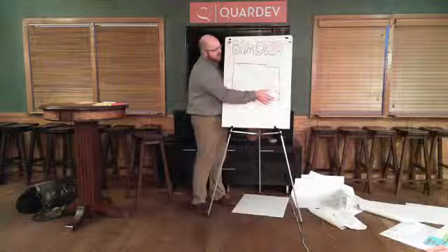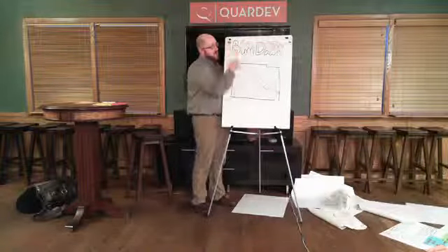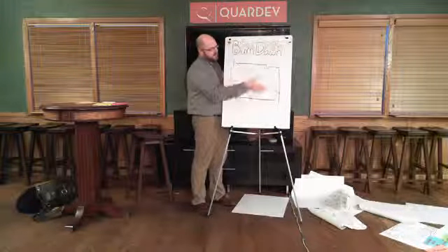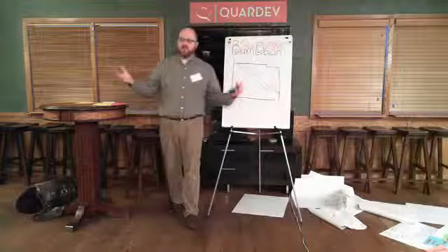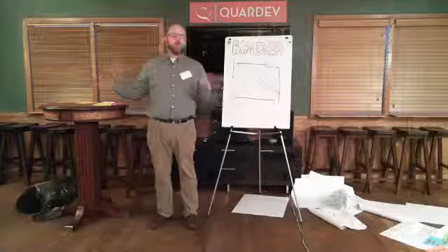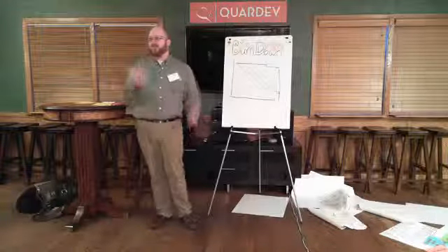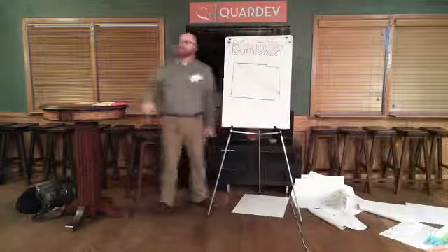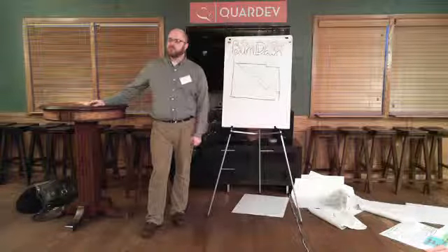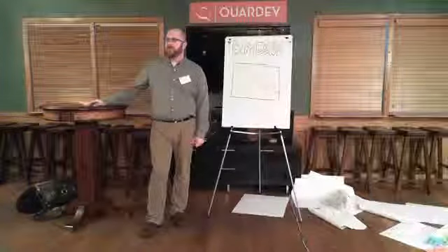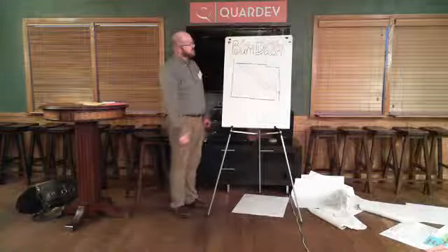And then over time with that, or if you size those at story points, it's kind of not ATD related, but if you size those bugs in story points, then you can get a rough estimate of maybe over a project what percentage is actually going to be taken for production bugs, and then you can track that against your project. That's just story planning. And it may be metrics that over time say maybe you need to sequester a dedicated team for this if it's impacting velocity too much or whatever. All right. Other questions?